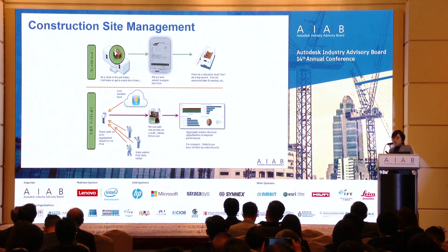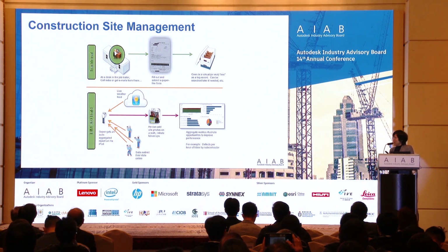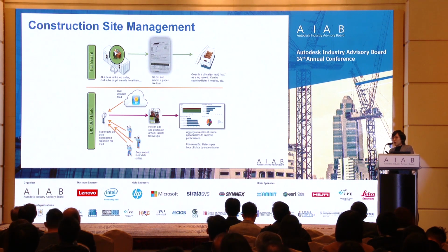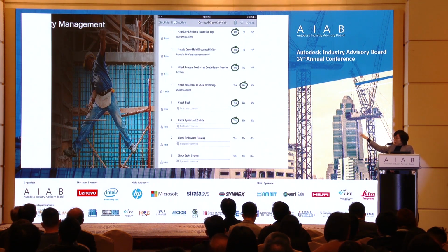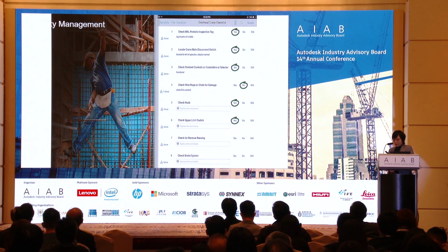But for our BIM 360 Build, the field management allows you to create digital forms of all these checklists and then distribute them by iPhone or tablet. And then they just fill in the questions here, or take some pictures, or make notes, and then all these records will be synchronized to our BIM 360.